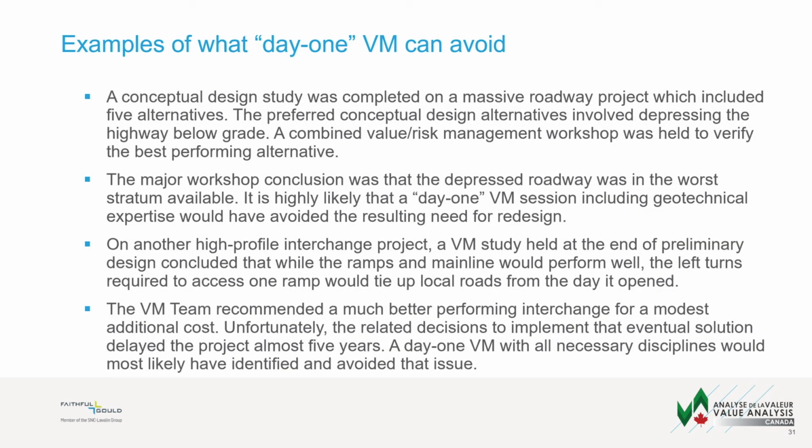So here's a couple examples of what day one value management can avoid. A conceptual design study was done on a massive roadway project, which had 5 alternatives. The preferred concept involved depressing the highway below grade, and a combined value and risk management workshop was held to verify the best performing alternative. The major workshop conclusion was that the depressed roadway was located in the worst stratum available. It is highly likely that a day one VM session, including geotechnical expertise, would have avoided the resulting need for